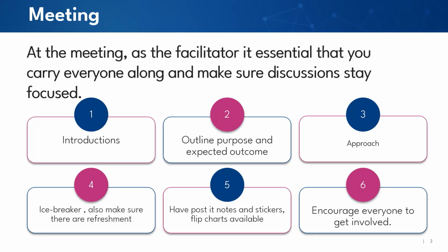You can put on the wall in the room that you're using a flip chart or a sticky paper on the wall. This side is for planning. This side is for the implementation. This side was the delivery. This side was when we were closing out. What lessons did you learn? You have put white paper there, and then you've given everybody sticky notes of different colors, right? So what you would then do is you would say, okay, guys, this is the approach. I've put paper all over the wall.